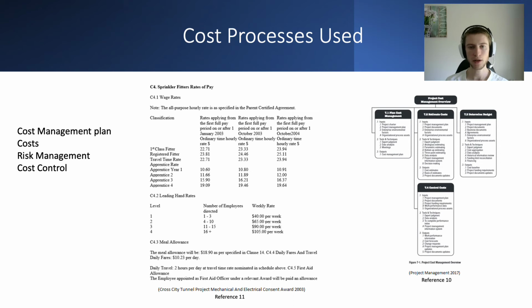A $5 million contingency fund was used to improve risk management. Although the cost baseline could not be specifically found, it is likely performance of the project was weighted against the baseline, which assesses costs associated with the timeline of the project. As the project progressed and individual work packages were assigned, it is expected more accurate bottom-up estimates could be produced. It's expected earned value management was used as a form of cost control. This would have allowed schedule, scope, and cost baseline to be monitored.